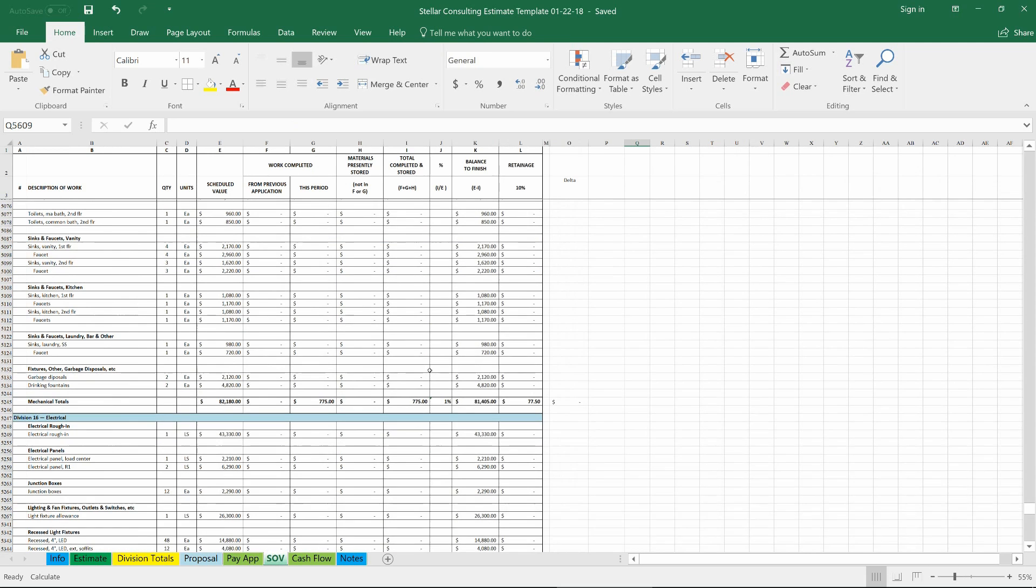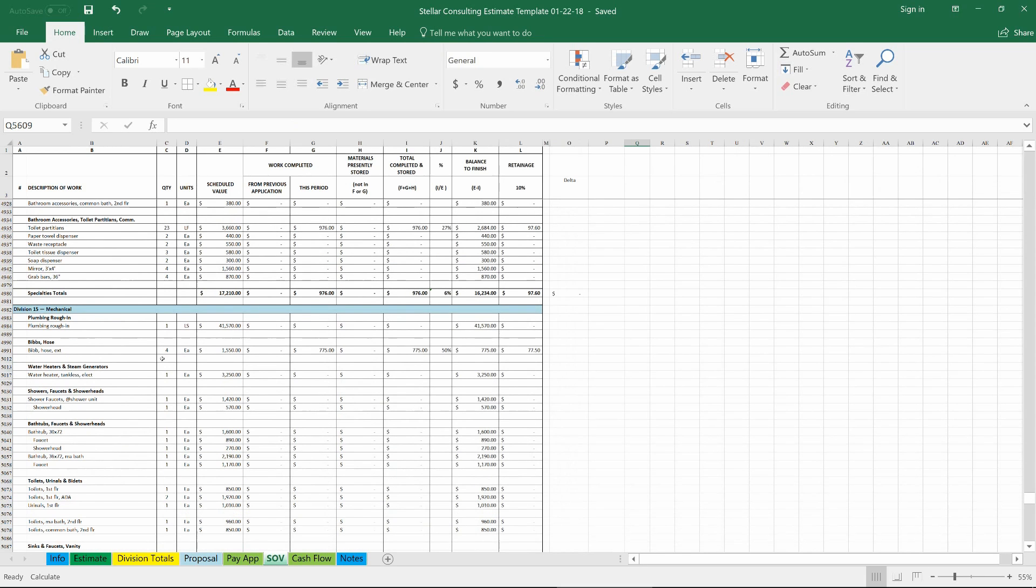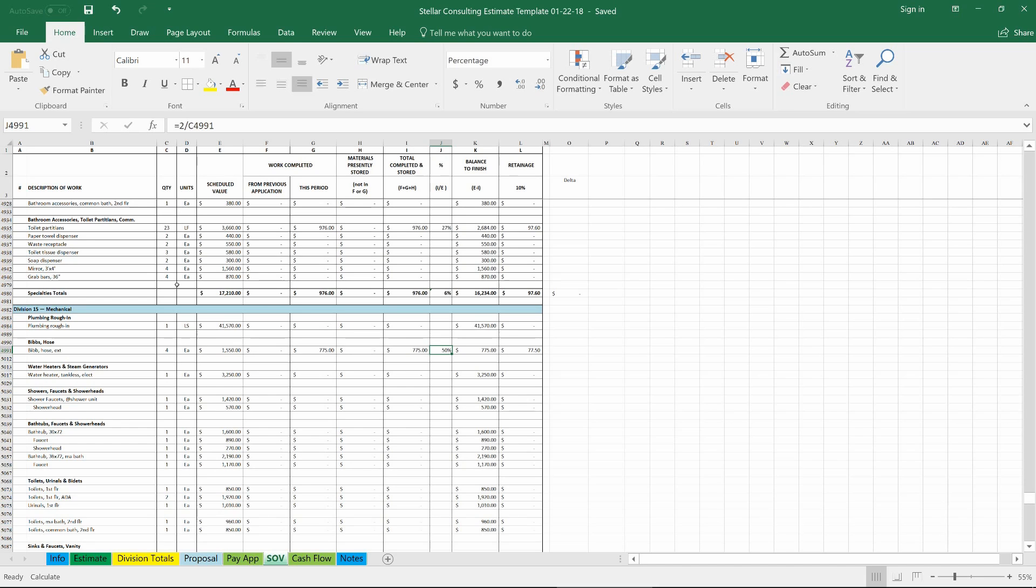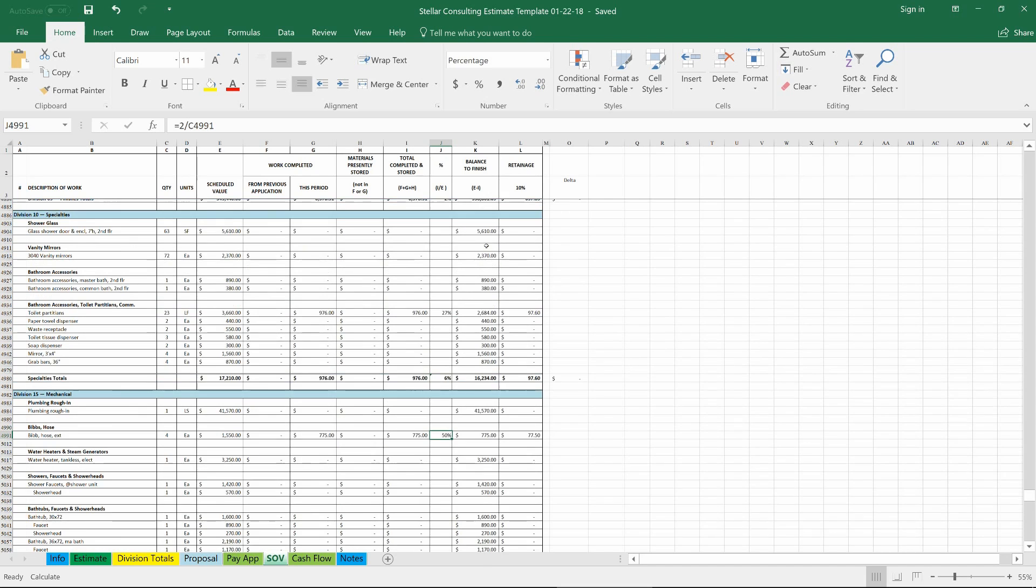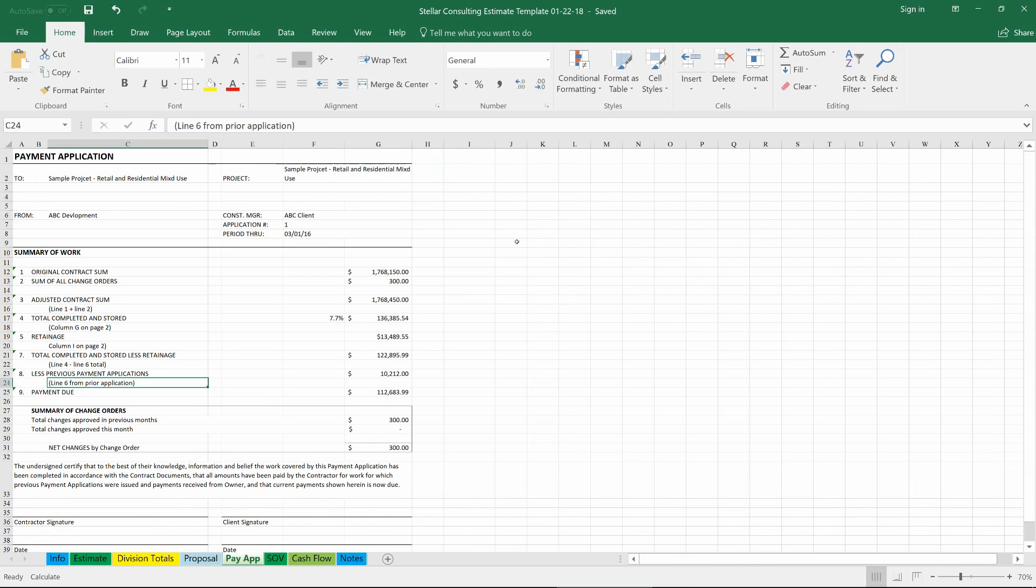I went ahead on this sample spreadsheet and filled in some items and as a real brief overview on the percentage of completion, we could come in and literally just type in the percentage of completion if we knew it or if in a case like this if we knew that there was two of those four items that had been installed then we can literally just plug in that formula equals two divided by the total and it will automatically calculate everything else as an example. And this is something that can be done on a tablet walking the project with an owner and the contractor and subcontractor so that everything can be measured and verified item by item right there in the field and even emailed out proposed pay applications, pay certifications on the spot.